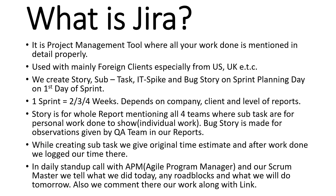We create a story in Jira. For example, let's assume there is a sales Power BI report. Under that story, everything will be mentioned for that sales report — what the database team is going to work on, what the business analysis team is going to work on, what the Power BI team will do, and what the QA team will do. All four teams' work will be mentioned properly in detail under the story.